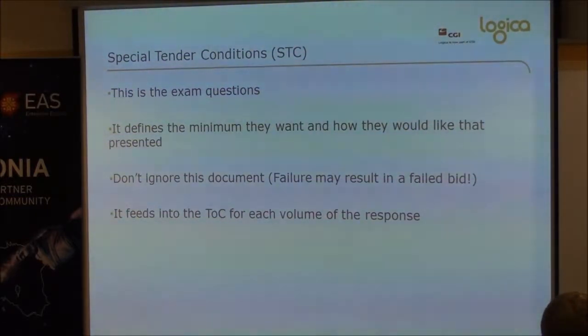It's always wise, if you do submit via post, to make ESA aware of that. Because if something goes wrong and DHL or someone else is delayed for some reason or another, you've got some recourse to go back. Otherwise you don't have a piece of paper or any evidence that you've done that, and what day they did it on. They advise typically shipping 5 days prior. So if you think about that, you've got a 4-week bid period. It could be a week gone, just on the shipping. So understand your constraints.